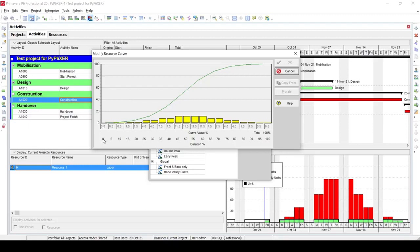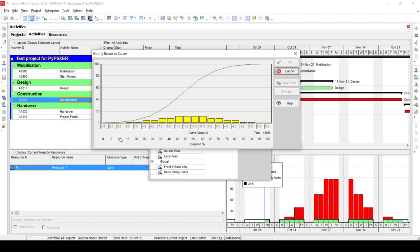Basically here it says that when zero percent of the time elapsed, it is zero units or zero percent of the units. When it's five percent of the time elapsed, it's 0.5 percent of the units will be assigned to that period, and 10 percent will be 0.5, and then 15 percent will be 1.5. In order to do this calculation and to check whether that will match our curve generated by P6 or not, what we will need to do is take this out from here and plug it into an Excel sheet, which I have done.